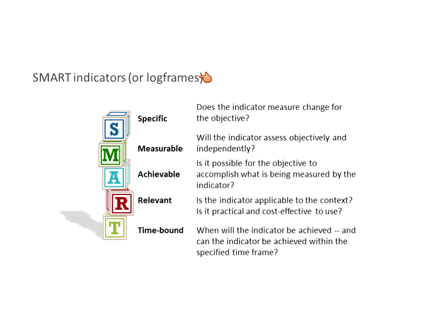Why do I say log frames? Because sometimes we're not actually going to put the numbers into the actual main log frame table itself. We're sometimes going to produce an indicator tracking table. That's a good thing, because then when you have an indicator tracking table, it's easier to make changes when you do measurements, because sometimes you don't have your baseline measurements, or you're estimating when you're writing your log frame.